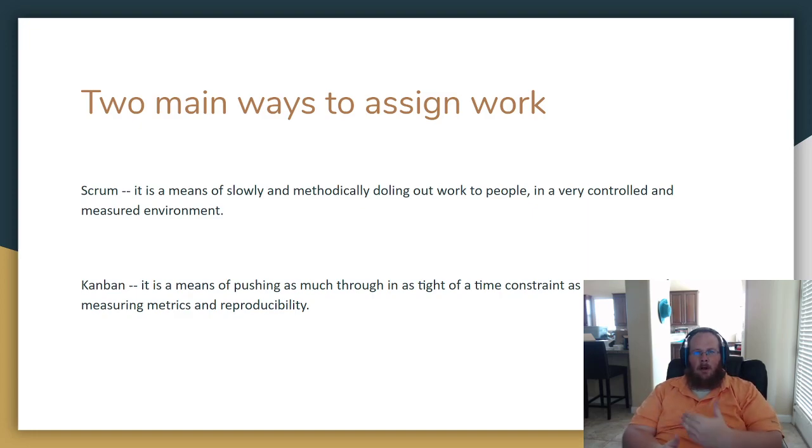However, as you go along, the same person could estimate that installing a door just under the hinges, not getting the deadbolt and the doorknob attached, but just installing it onto the hinges into the frame, they could say that's a 1. And you could go, oh, okay. So a door compared to a foundation is 1/8 of the work. And over time, these numbers end up indicating some sort of metric. They're never quite precisely a metric, but they're near a measurement.